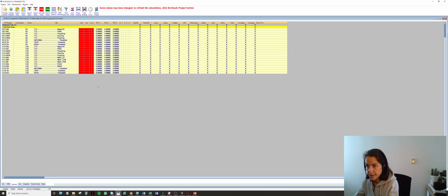So now in the case of the turbo data entry, we have created our PTWBS, and basically what we want to do now is to generate the Excel file, the template that will be used by us in order to import at the correct format the data from Excel.